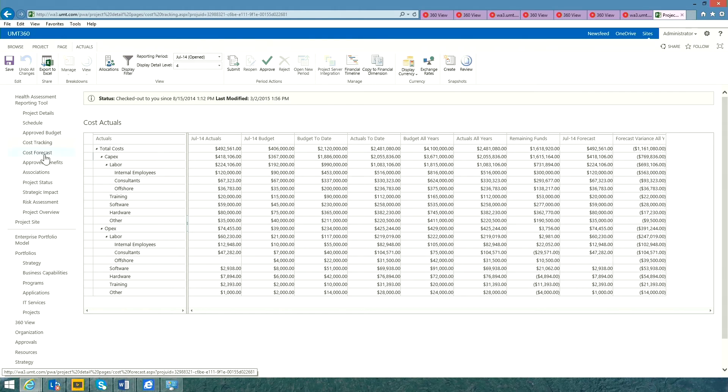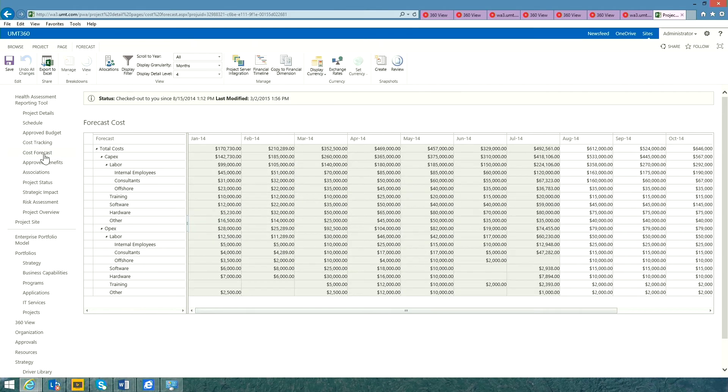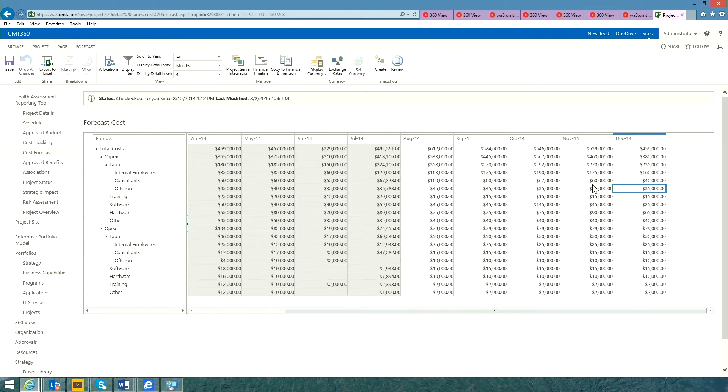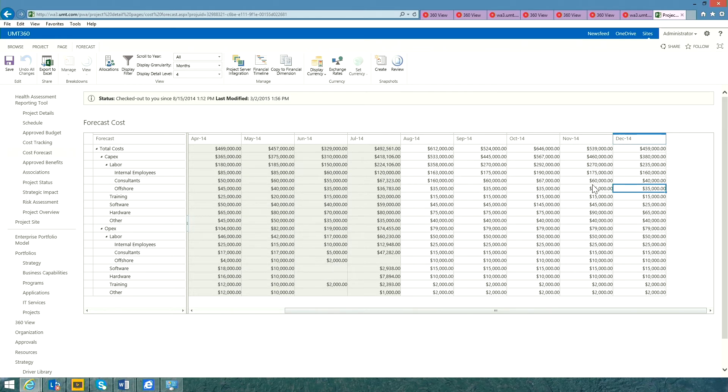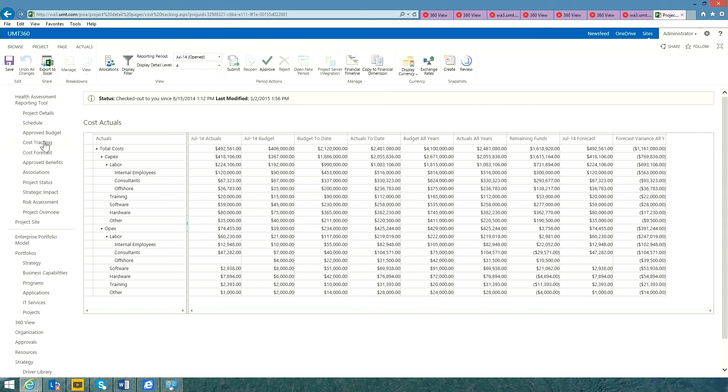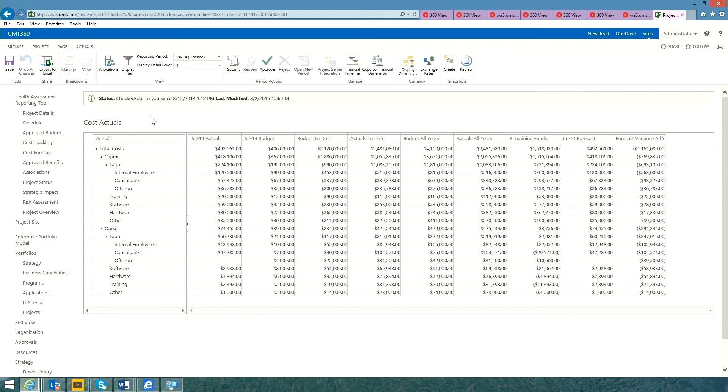But we also want to capture the remaining costs. If I open up the cost forecast tab, I can now capture the remaining costs for the open periods left in the project. Having captured both the actual costs and forecast costs, we're ready to submit this financial status report.